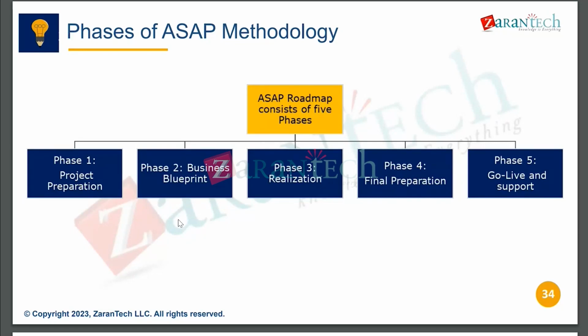So once the system is released to the business, we'll provide the go live support. Go live support is free of cost for a certain period of time. As per the contract, it will be 3 months, 1 month, 5 months, 6 months, where the implementation team will support. Whatever issues there are in the production user spaces, they'll create a ticket or a request.